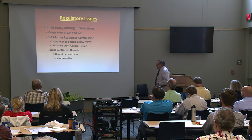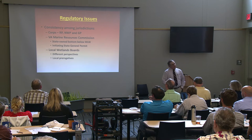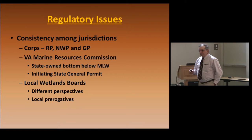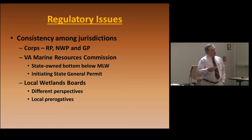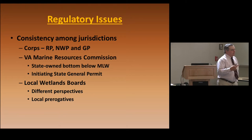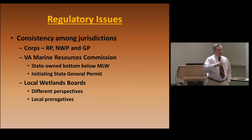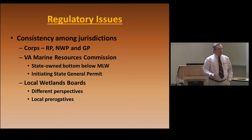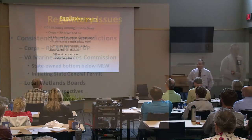All right. So much for the philosophy. In Virginia, they have a joint permit application. You fill it out. It goes to everybody. It goes to the Corps. It goes to the state. It goes to the local wetlands boards. It goes to the Department of Environmental Quality. It goes to every Tom, Dick, and Harry in the state.